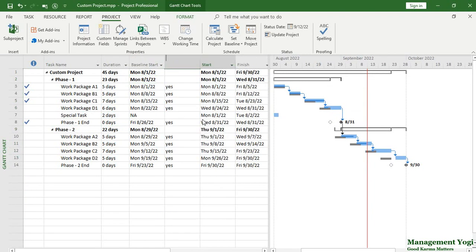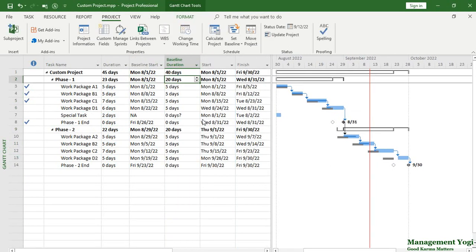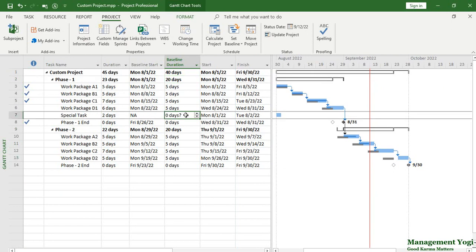To verify, I'll right-click, insert the column, and add Baseline Start and Baseline Duration. As you can see, for the existing work packages, baseline start and baseline duration are properly populated. But for this special task, baseline start is showing NA (not applicable) and baseline duration is zero with a question mark — meaning it has not been set. This is also reflected on the graphical side.